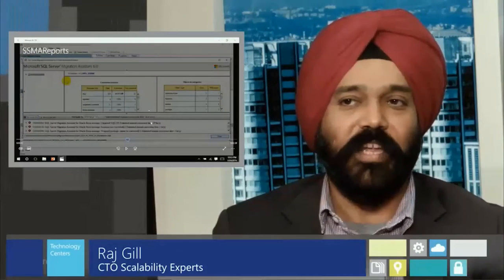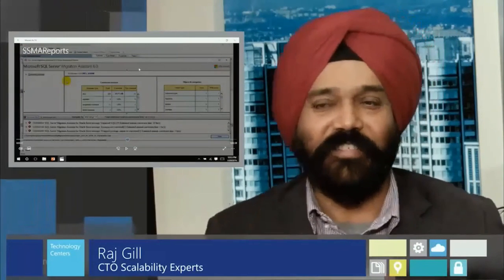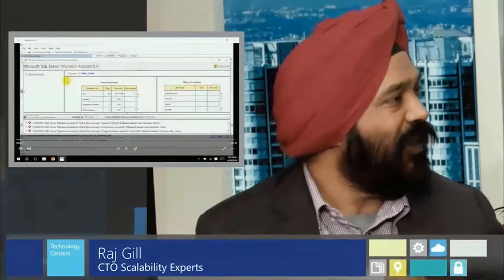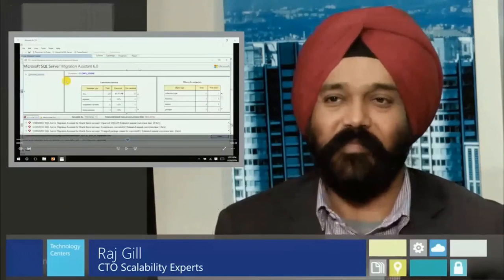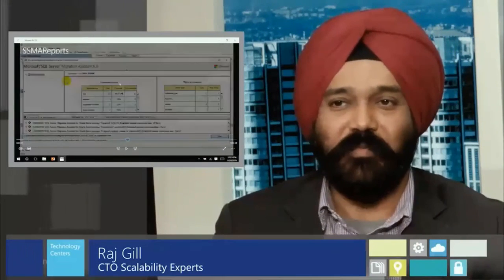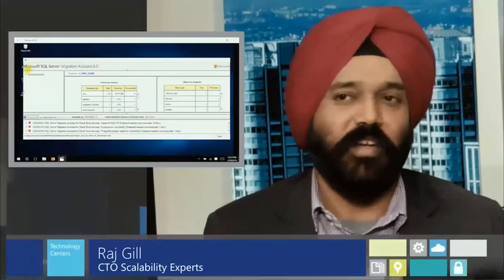And as you notice, for each error, it also tells you how many man hours it takes to convert. I was looking at that. So say 29 and so forth. Again, like I said, don't get too concerned if you see these hours add up. Hundreds of hours add up, yes. Typically, you could do it much faster. I'm assuming it's also making some assumptions that the user doing this either doesn't have experience with migration, maybe it's their first time, so it's buffering some hours for that as well. You're absolutely right, Kevin, and that's exactly right. Having an expert such as yourself there can plow through these a little bit easier.